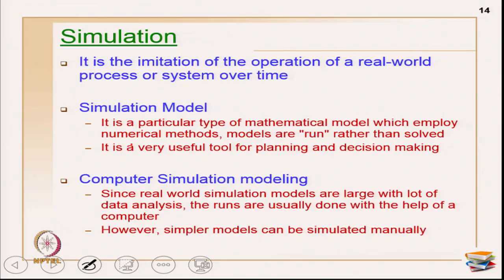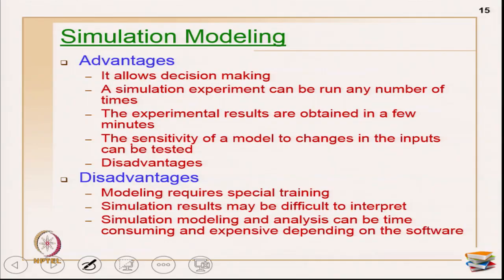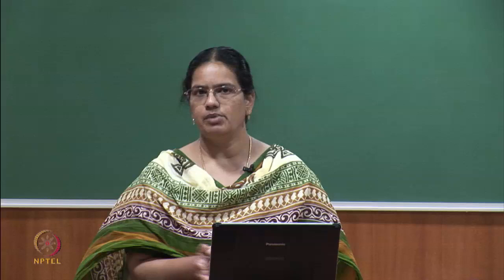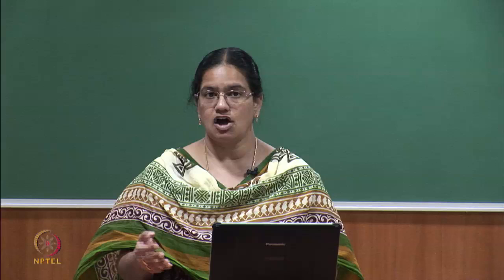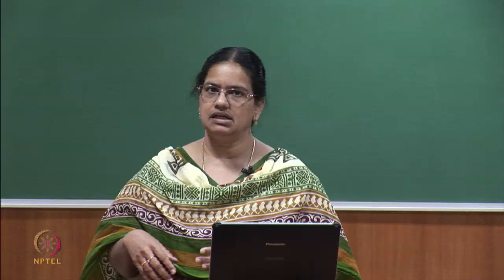But simpler models can be simulated manually - in the previous example I showed the manual way using a bar chart. The primary advantage of simulation as an experimental technique is that it allows decision making. You cannot make trucks move on the road and then calculate; you need to decide how many trucks, loaders, and excavators you need, how long equipment waits, and how to cut down duration. For all these decisions you need a simulation model.